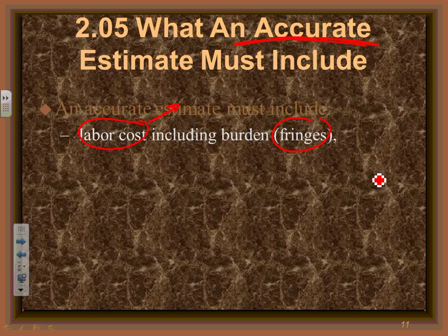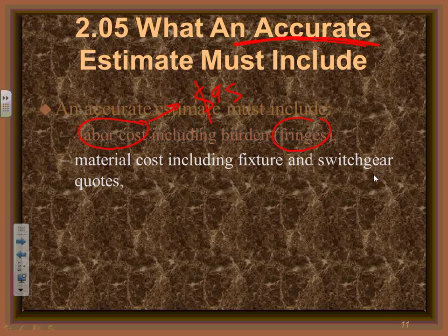So the dollar value that I'm going to put on my employees is $75 an hour. I'm going to charge you every time I send you to work $75 an hour. That includes your burden, the fringes and the burdens, benefits and unemployment that I have to, as a company, pay on you. We're going to be installing these in the software. So the cost of the labor.